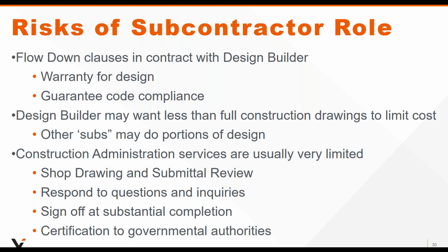So what we see most often are flow down clauses that apply to you, because you are in a contract with a design builder that has warranted the design or is guaranteeing code compliance. And the challenge for you is that things like code compliance often rely on installation and adherence to quality standards by the contractor. So whether the completed facility meets code is not necessarily related to the services that you provide.